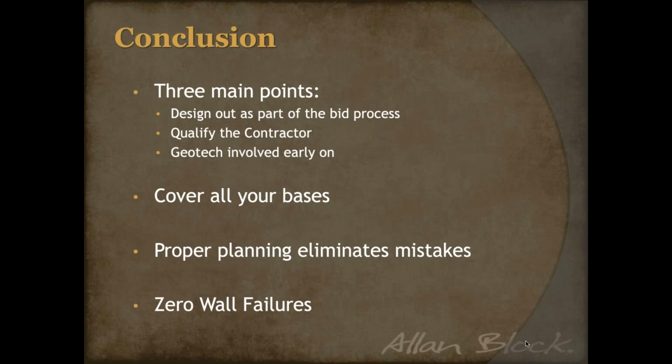When they're involved early on, we can get all that soils information. If we need to do a geotechnical report, they can get started on that early. And when that gets done, we can start the design of the wall early, which we've talked about so many times. It's very important to do that.